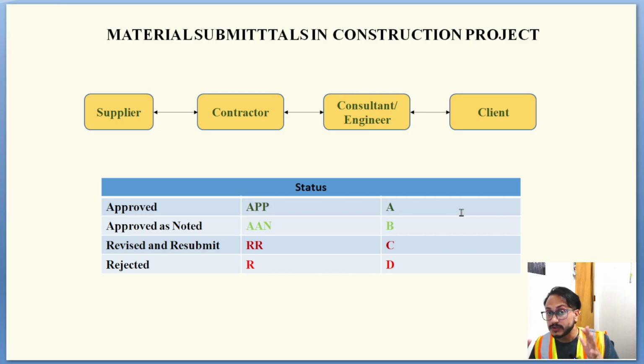So that is why you need to take care of the material submittal. You need to submit all the material submittals on time, so that you can order those materials on time, because if you miss ordering the materials, you cannot execute the work at site, right? So this is all about material submittal.